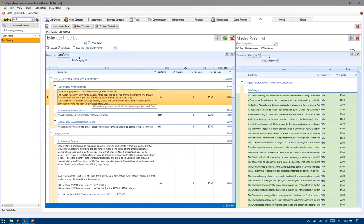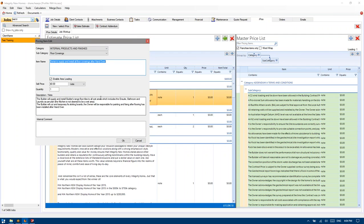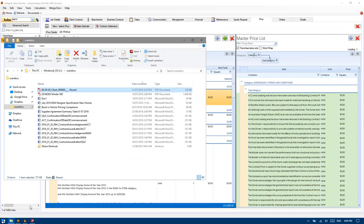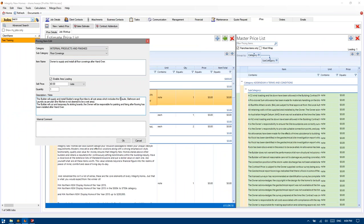Now, here's a note that does need adjusting on a case-by-case basis. The note itself has been written based upon a standard four-bedroom, two-bathroom home. If we double-click on this, you'll see it actually defines the wet areas and where we're providing the tiling. If there are any other wet areas in the home, they need to be clearly noted. So we've got a WC and a powder which haven't been specifically stated. We'll just write WC, powder, en-suite, bathroom and laundry.